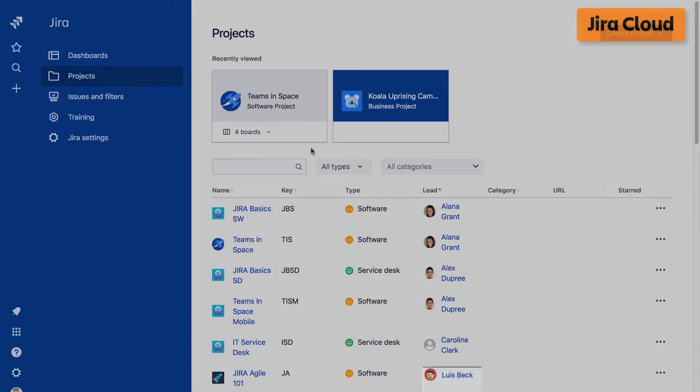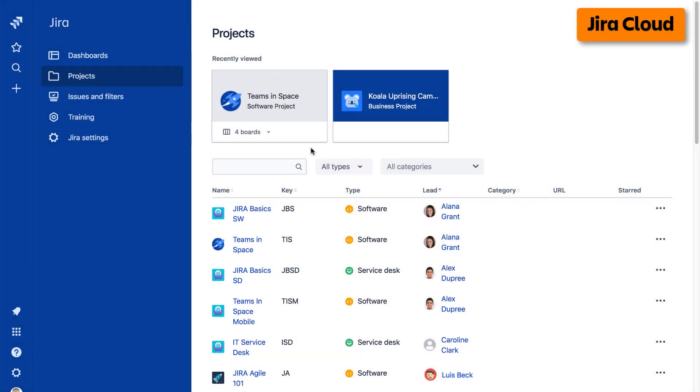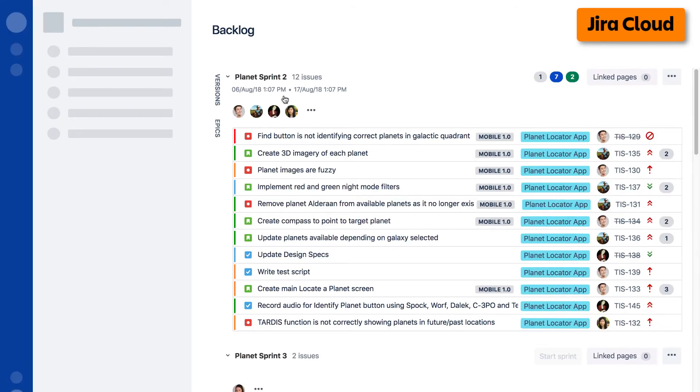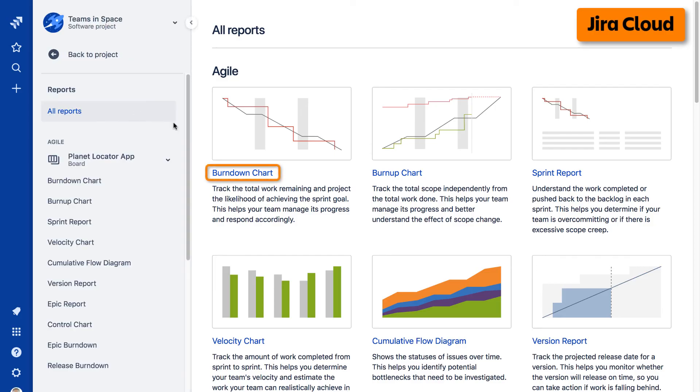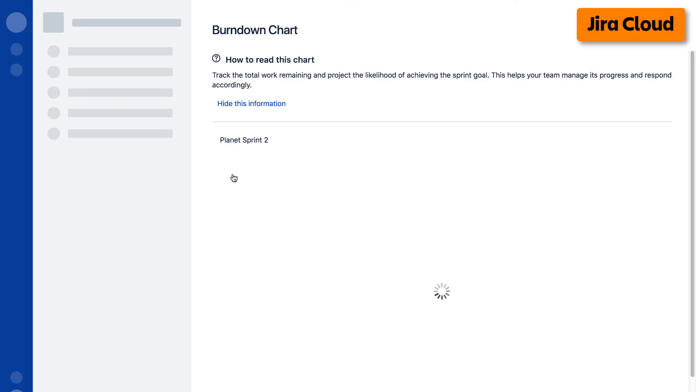To access reports on the cloud version of Jira, navigate to your desired project, select Reports from the left taskbar, then select the desired report from the Agile Reports display.